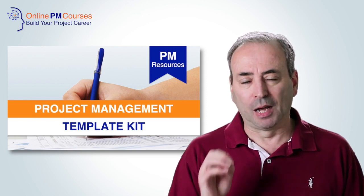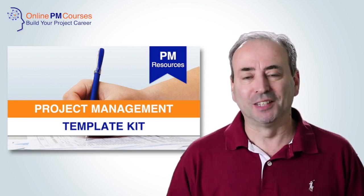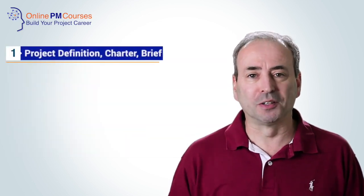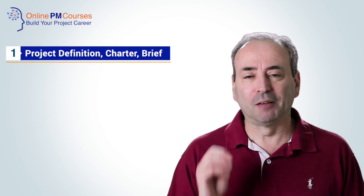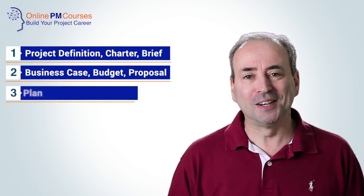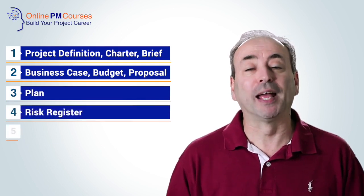But I do want you to focus on the 5 top tier key deliverables that I do consider are essential. Make sure you've got a definition of your project, some form of budget or business case, some form of a plan, a risk register, and something to document handover.